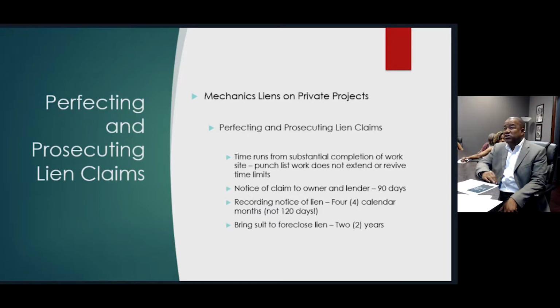Time runs at substantial completion of the work site. Now, I want to stop for a second here to explain what I mean by substantial completion of work performed. You may be a subcontractor on the job, and I'll use this as an example. You may be the excavator, and your work is done primarily early in the project, and you're completed earlier in the project. If you have not been paid, the timeline is associated with your substantial completion of your work. It is not the substantial completion of the entire project. If you allow the project to continue to its substantial completion, you've missed your opportunity to file suit.